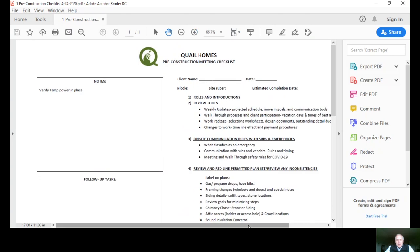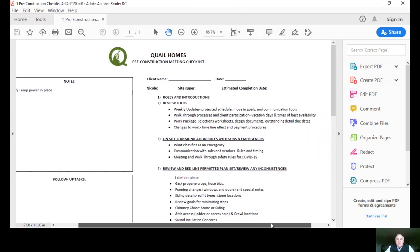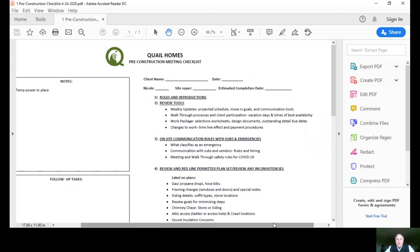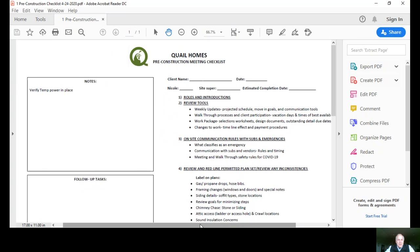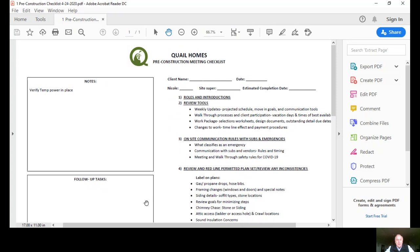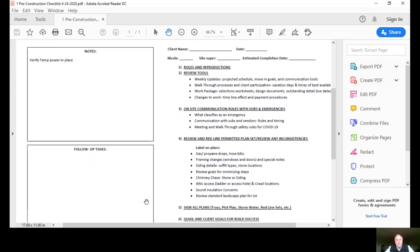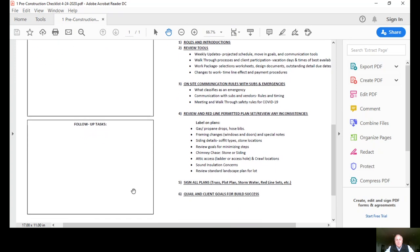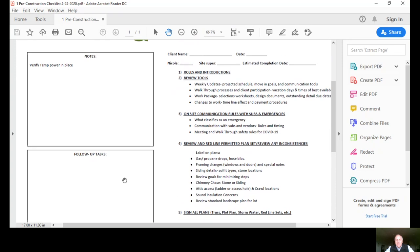In today's discussion I'd like to talk about our pre-construction meeting. This is a form that we use for each meeting. We prepare in advance and ask our clients to do so as well. On the left are notes, so we'll put items in the notes section preparing us for the meeting of what we want to talk about. We suggest you use your form the same way. The box below is after the meeting for what our follow-up tasks would be.